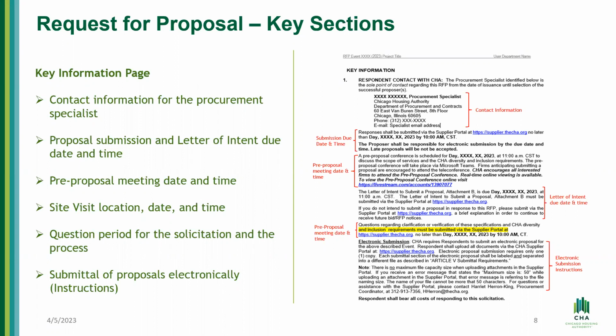Okay. The way that you will receive those answers is going to be in a letter named addendum. So your answers are going to be combined with all vendors' questions. Okay, so please don't expect that you receive just your answer. It's going to be combined with all the vendors' questions and answers, which I think is very helpful for you in case you don't have any other questions, so you can see the questions of other vendors.